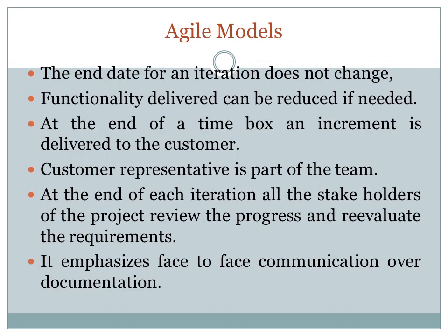Now let's look into some features. The end date for an iteration does not change. That is, the time box has fixed start and end dates, and if necessary, the functionality of the iteration or the increment that is developed can be reduced.